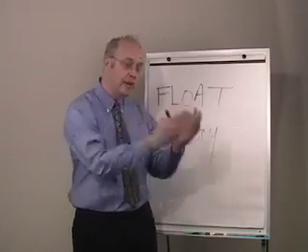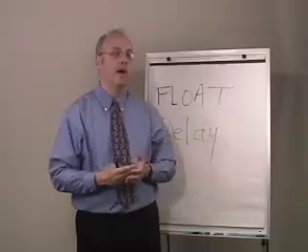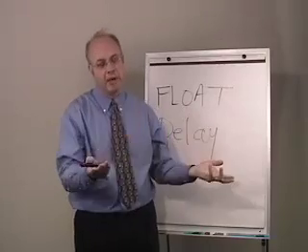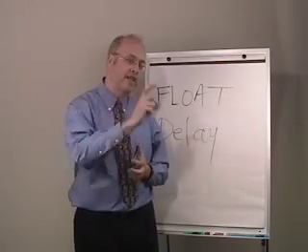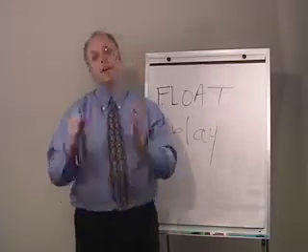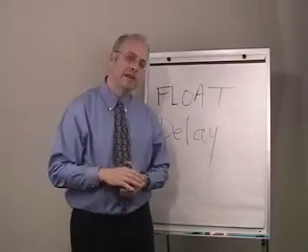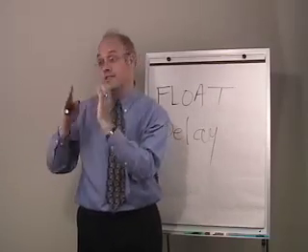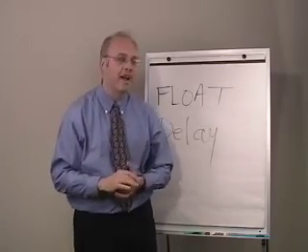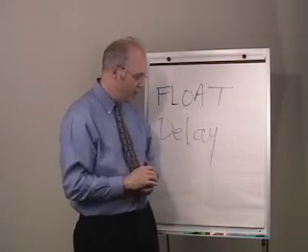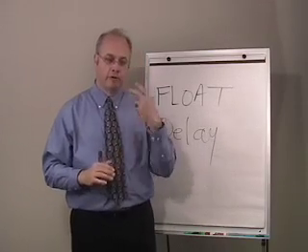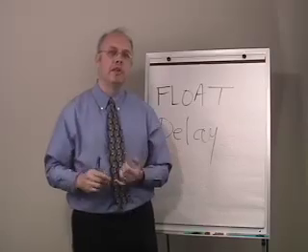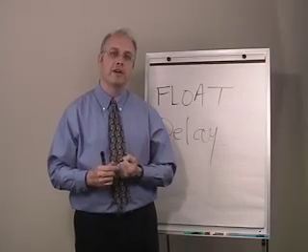And similarly, if a contractor has a problem that consumes float, say a subcontractor doesn't show up, if there is float on that subcontractor's work, then they will be able to complete the project by the scheduled completion date. And if the scheduled completion date and the contract date are the same time, they'll be able to complete the contract on time. Float provisions in your contract are extremely important, so review your contract closely.